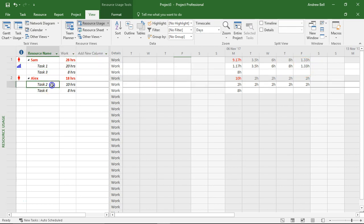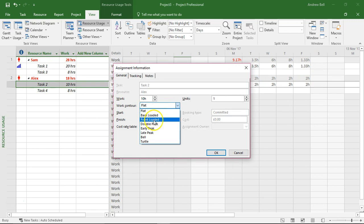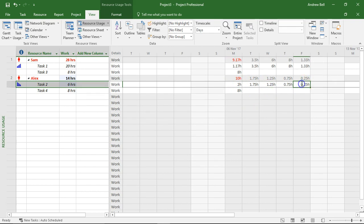On Alex I'm going to make this one front loaded and then Alex will do more of the work at the beginning two hours on Monday and then less as we go through the week. And because these fitted into the week's duration there was only 20 hours of work and there's only 10 hours of work and there's been no issues.